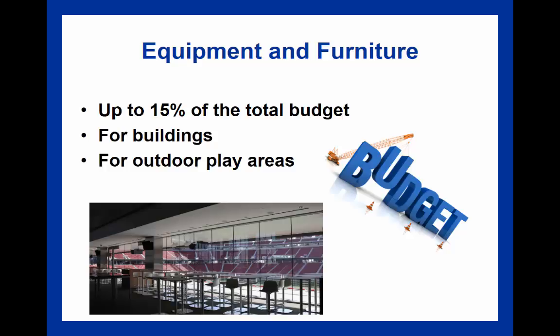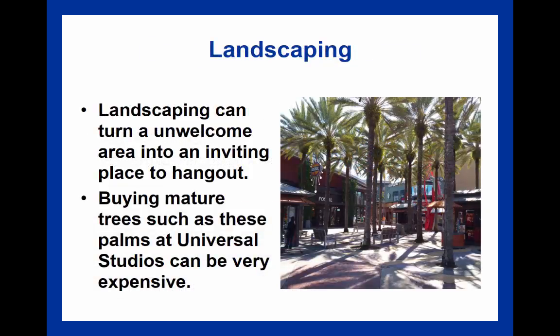Direct costs are going to be costs for labor, maybe materials, your equipment, any potential subcontracting. Indirect costs are going to be any sort of legal fees or insurance, printing costs, anything that's not directly associated with putting together the building. So this is certainly important. And then landscaping is certainly important.